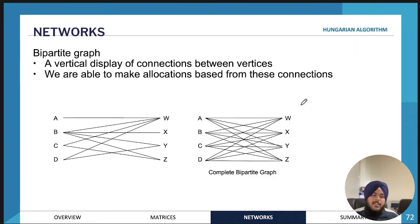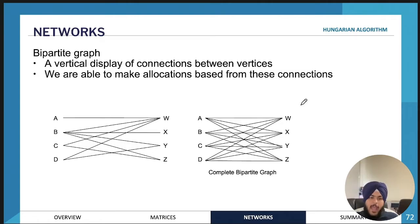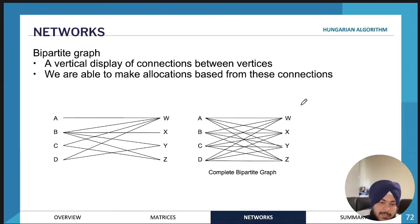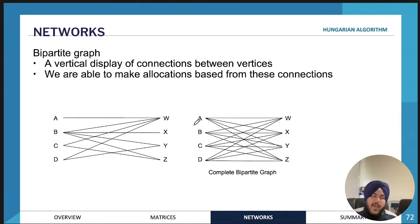A bipartite graph is used for allocation problems. For example, if we have a project coming up and five people willing to work on it, and there are five different tasks that need to be performed, each person can perform each task in a different overall time. What you need to work out is the best allocation to complete the project in the minimum amount of time.